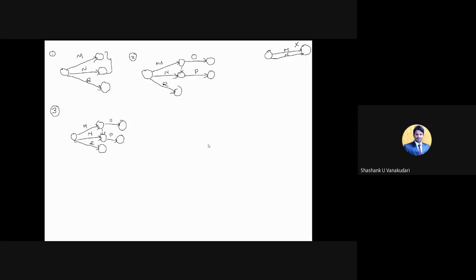So by using the third condition, that is activities R and S are concurrent and depend on the completion of O. Now the R and S activities are concurrent, so I can write activity R and activity S here. They start concurrently just after finishing this O activity. The third condition is satisfied now.